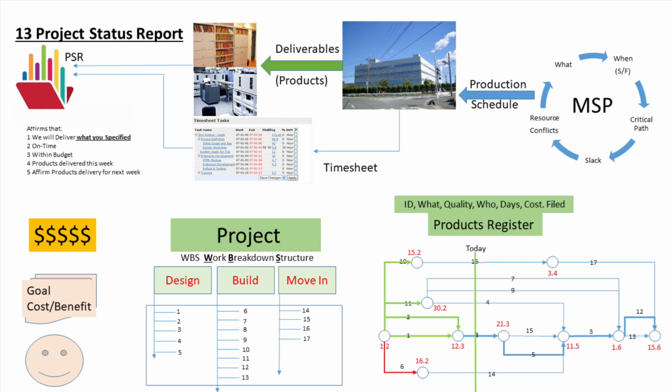Now, I will touch on one important aspect in our example of product 6 being late. At the moment, we only know that product 6 was not delivered on time and that it will be delivered at a later date. The lateness of product 6 may squeeze the schedule for product 14, but needs to be finished by the 11th of the 5th. Otherwise, the whole project will be late. But if 14 is actually a small task with lots of slack, we will not have a problem.